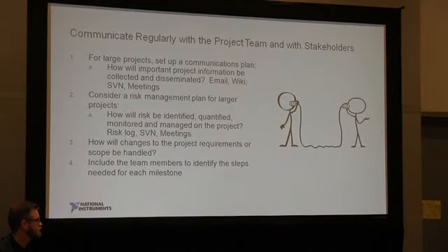We recommend doing weekly status reports from our team members, and that's a place to show progress, what you're planning to work on next week, but also, what are the obstacles to my progress? What information do I not have? What problems am I having? I need help from management or somebody else from the team to keep things moving along.